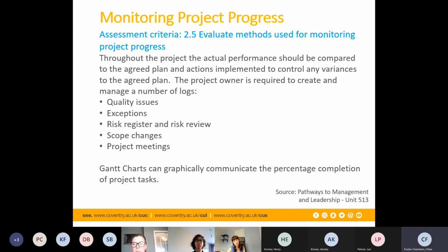We measure safety and monitor that throughout the project. There are different categories of how serious those safety incidents are. So you have near misses, where there could potentially have been a bad accident, but it was basically a near miss. And then you have high potential events, which might be really serious, like a plant overturning or something actually happening. So we monitor safety events, and as a result share lessons learned to avoid those happening again. And we have targets both for the company and the project, I believe, as well. Yeah.